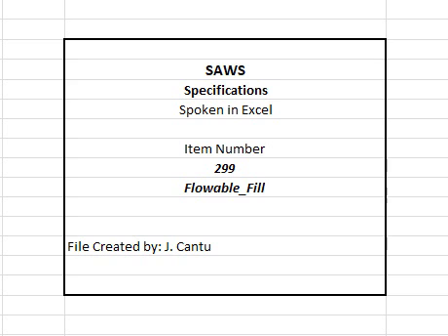5. The contractor will sample, take, and test all quality control testing. 6. Contractor to dispose of used, broken specimens in an approved location and manner. 7. The frequency of job control testing will be at the direction of the engineer. 8. SAWS will be responsible for quality assurance testing.